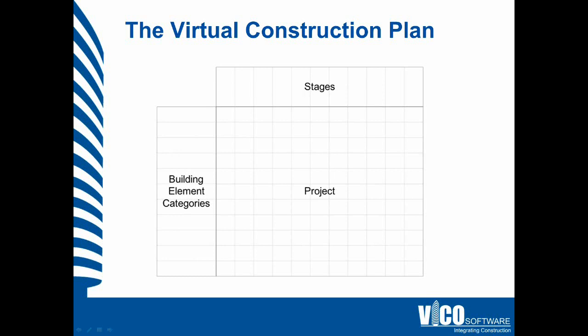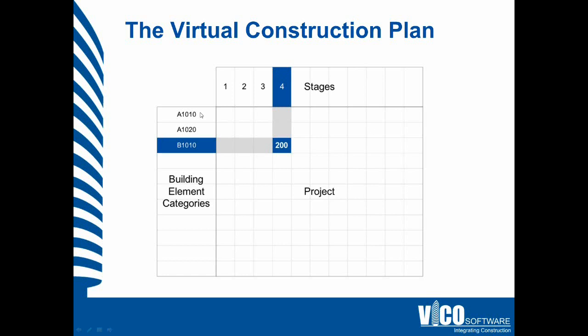Then across the top, we have the stages at which we want to release a version of the building information model. In this example we've got just three building element categories. We follow the UniFormat classification structure, but it could be any classification structure you'd like to use. The number of stages could be the number of meetings or decision moments set up for your project, and at each intersection you define a targeted level of detail.